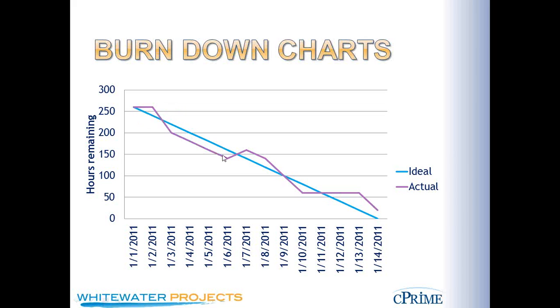This is not an unusual pattern to see. A flat line for the first day, quick, it may take a little longer or be a little bit further, but quick under the line here because people are working hard in that first sprint, or in the first couple of days of the sprint. And then it burns pretty close to the ideal line. This blue is the ideal. If the world was perfect, they burn quite even with that.